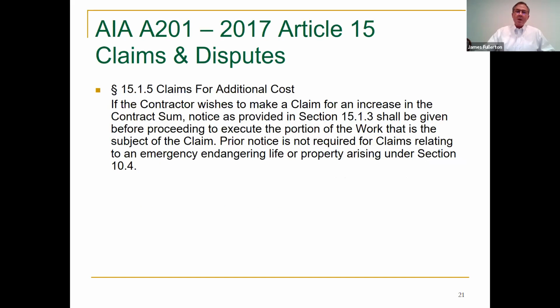And you must continue performance. You cannot stop performing just because you're sure the owner isn't going to want to pay you, or just because the owner won't agree to the increase. You must continue performance. If, however, there is a claim for an increase in the contract sum, the notice shall be given before proceeding to execute the work. Okay?